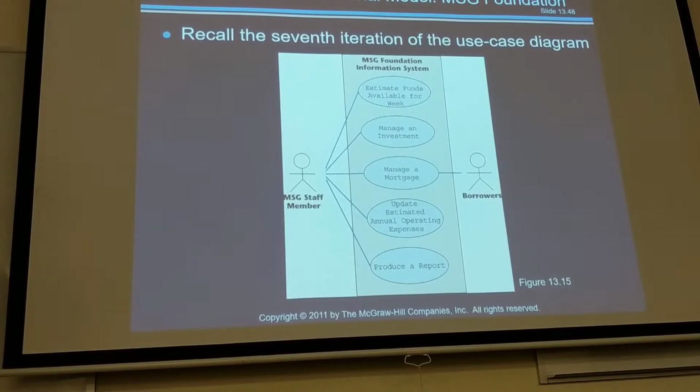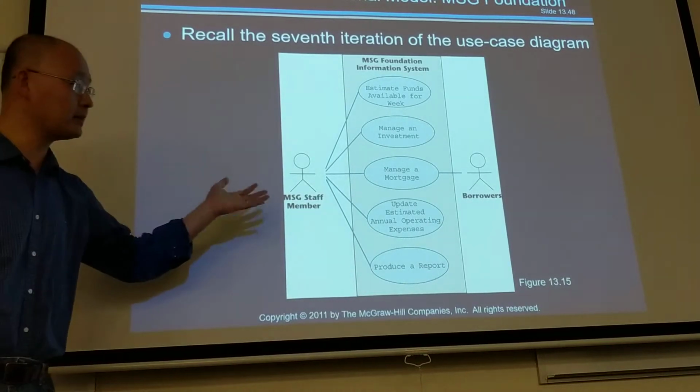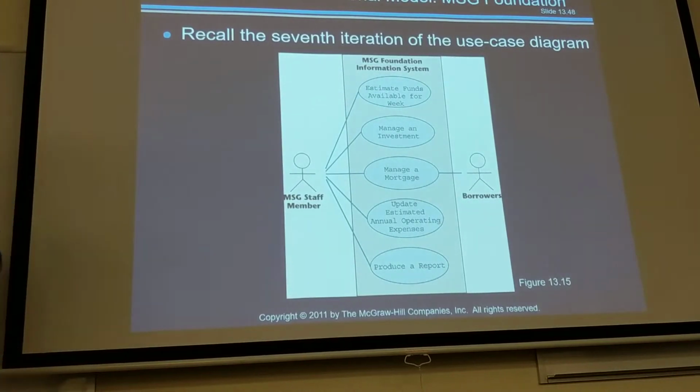But no matter what, eventually you should have a finalized contract everybody can accept, and you use that contract all the way through your development process. That's why we don't have a contract signed for 2 years. We have a contract essentially signed for 2 weeks. As a project manager or product manager, you can probably protect your development team for 2 weeks, but really no longer than that. For those 2 weeks, you are not changing the requirement, but the next 2 weeks, good luck. Highly likely the requirement will change. That is the nature of our business.